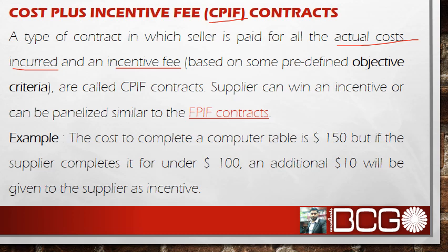Now this incentive fee is based on some objective which is predefined between the two parties while the contract is being signed. So the thing to memorize is you have to pay the actual cost incurred and an incentive fee.